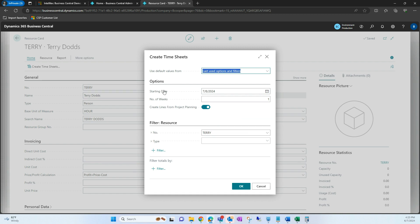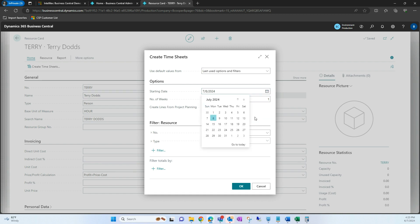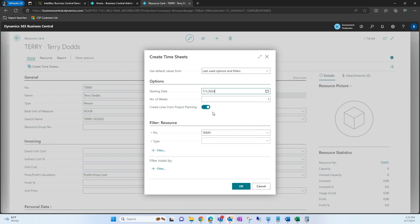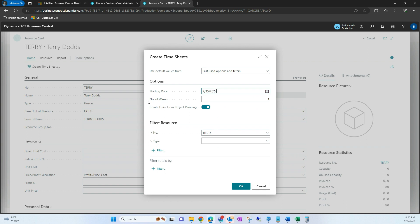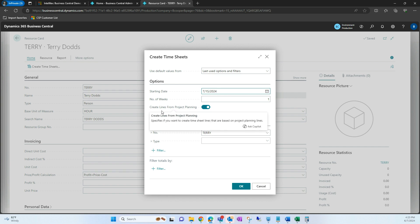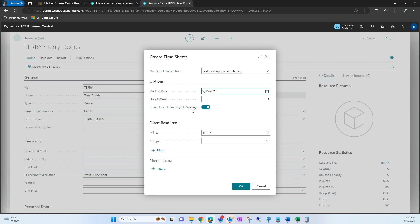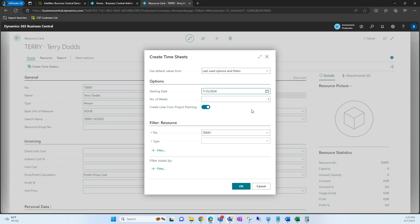You'll see we have a few options here. We have our starting date, which specifies when we want that week to start for that specific timesheet. I'm going to select July 15th in this case. We can also specify the number of weeks we're looking to create the timesheet for, and then 'Create Lines from Project Planning Lines' — if we keep this toggled on, we can create lines based off of our project planning lines.